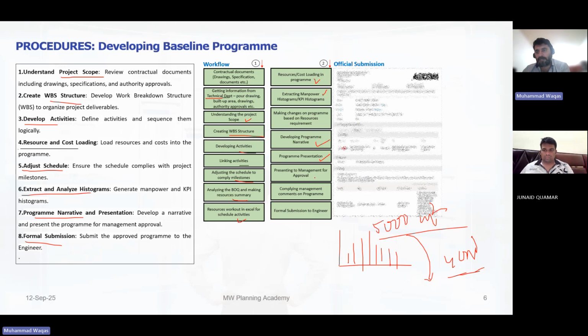If you have not discussed with them, they will come into the meeting and say, oh, this is the first time we are seeing this schedule. We never saw it. We don't know what this is. You know this happens, right? Happens. So to avoid these kinds of things, we need to get their input. They should sign off on the schedule, because at the end they have to execute it. They will be responsible.